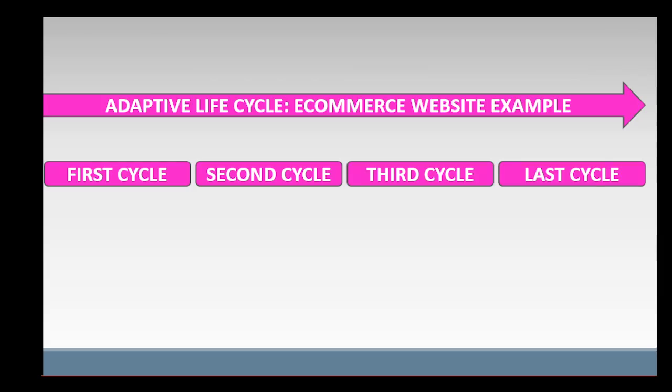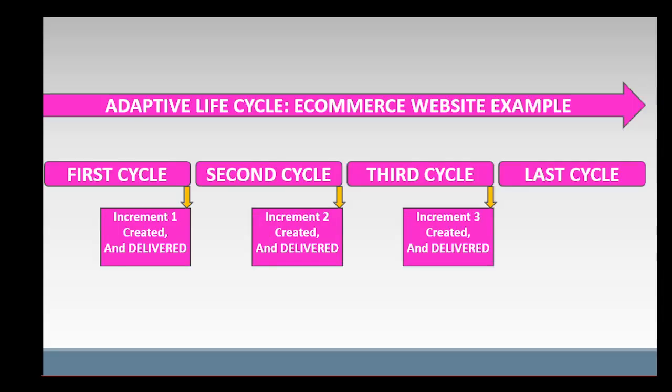For example, the e-commerce website development is divided into four cycles. In each cycle, the following e-commerce increments, increment 1, increment 2, increment 3, and increment 4 are successively created and could be delivered. If the client is satisfied with increment 4, created in the last cycle, the project ends.